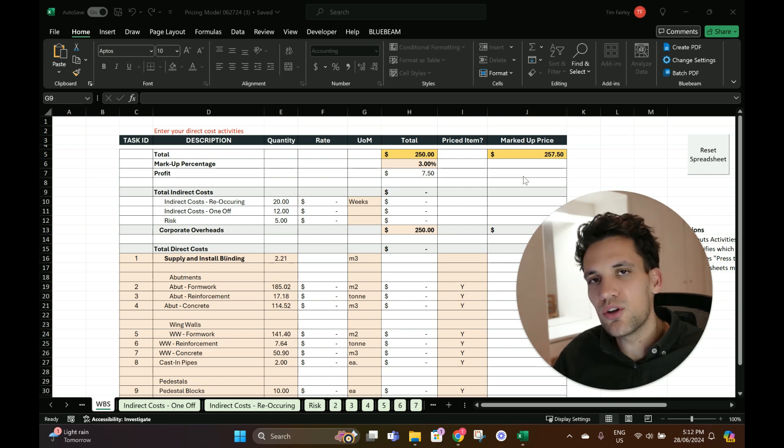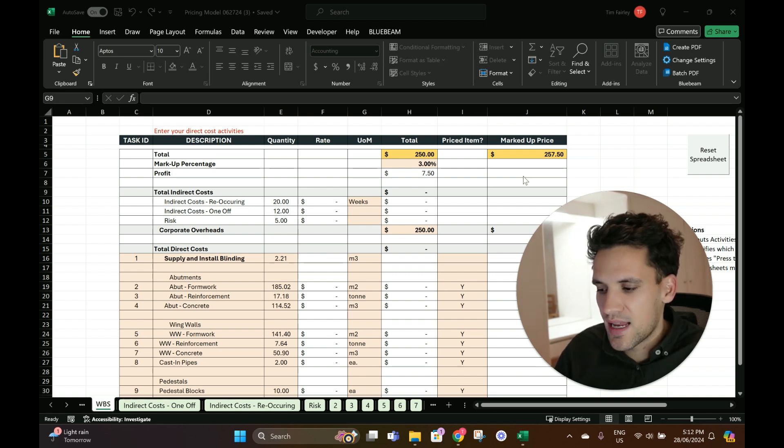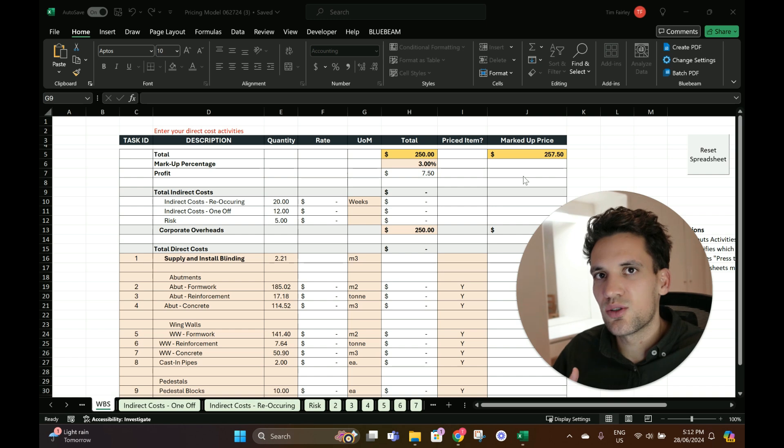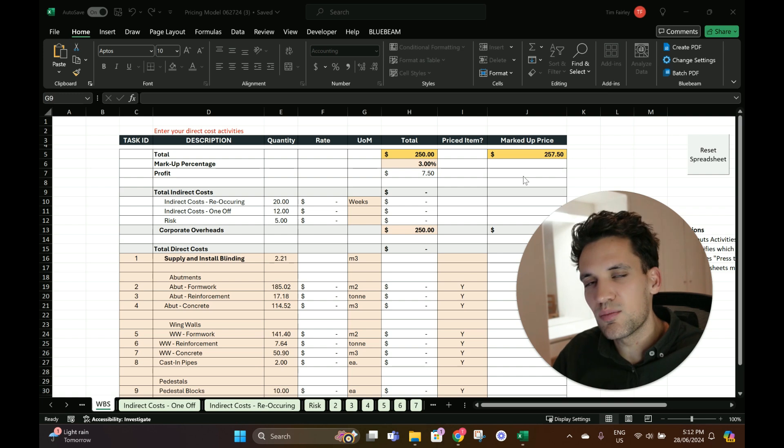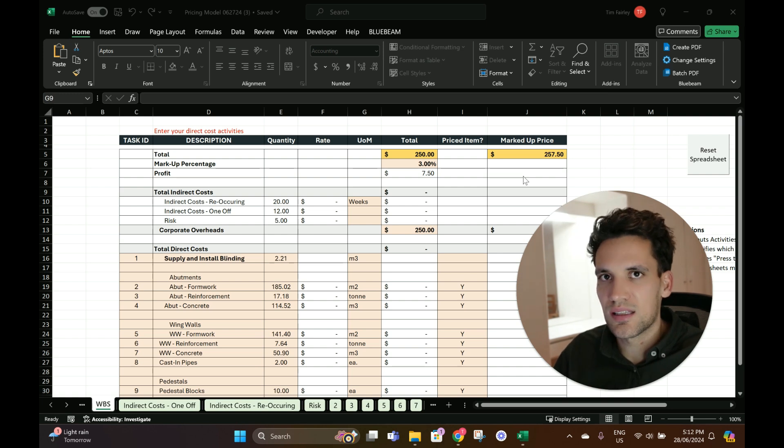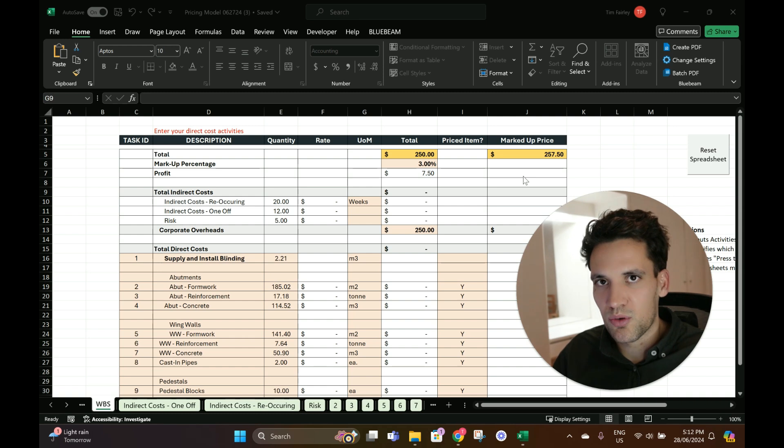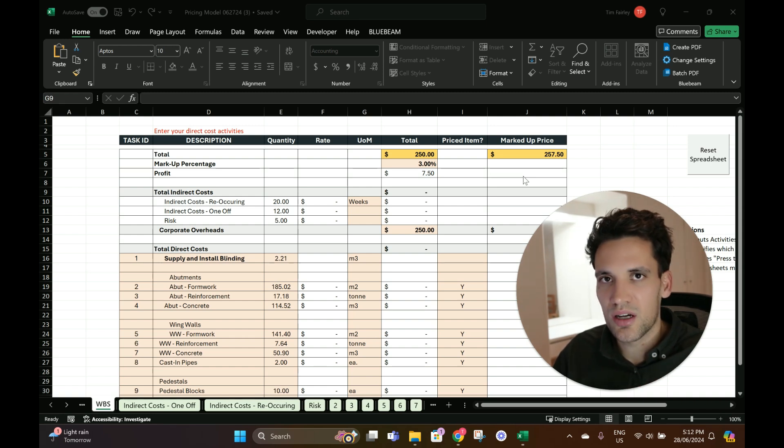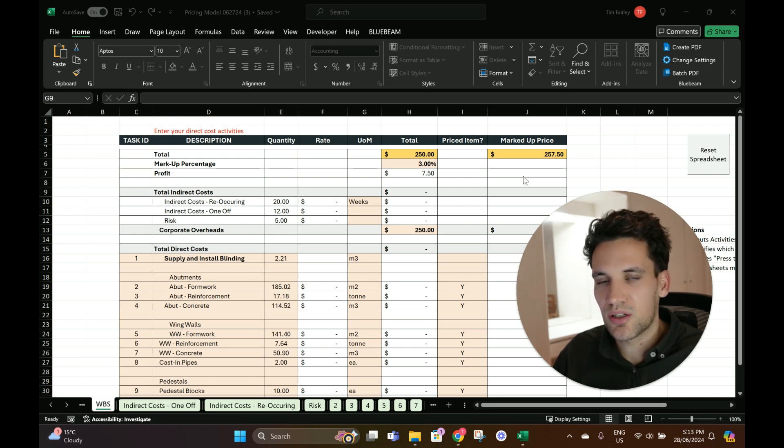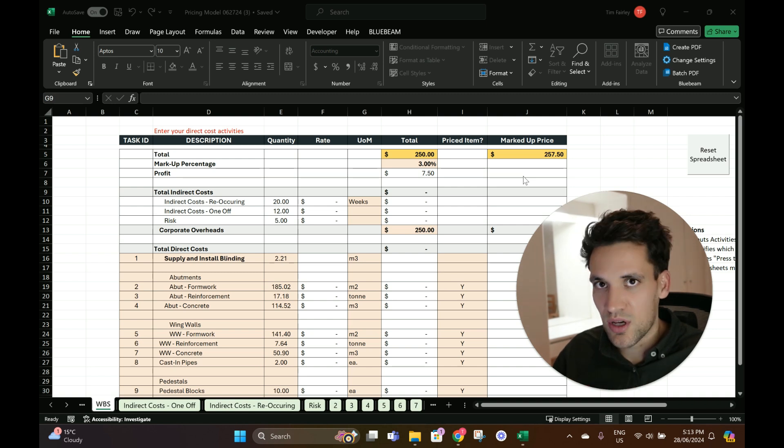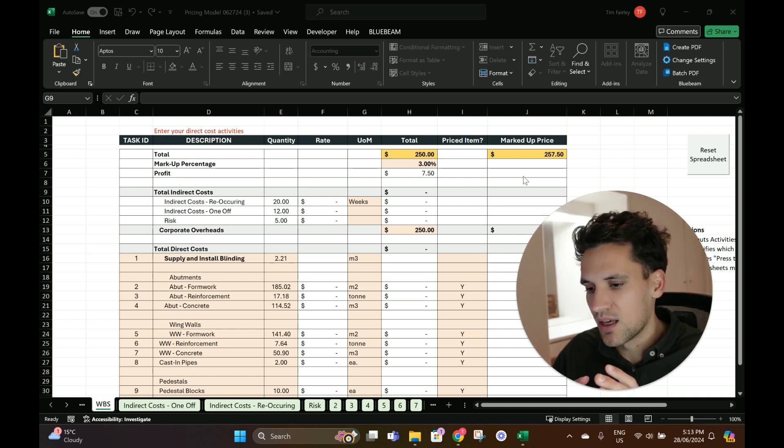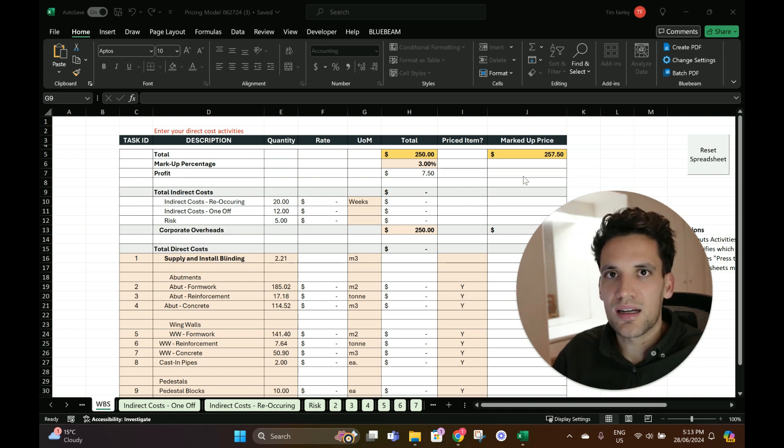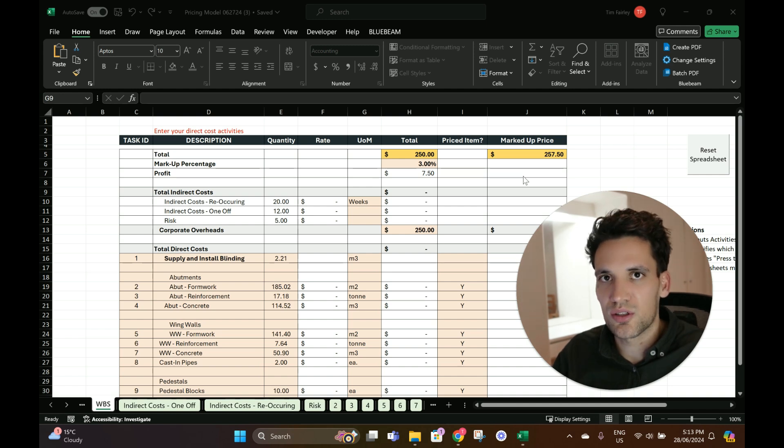I'm going to go through our estimating spreadsheet that we've created that we use for pricing our jobs. Basically the way it works is you get a bill of quantities or a pricing schedule from a client and enter it into the spreadsheet. We've written a macro so that for each item in the bill of quantities you can set the spreadsheet to create an individual pricing tab where you can do the build-up of labor, plant, materials, and subcontract costs. There's tabs for your indirect costs, recurring and non-recurring, also a tab for risk and opportunity. You can add a markup and that gives you a pricing schedule you can submit to your client.